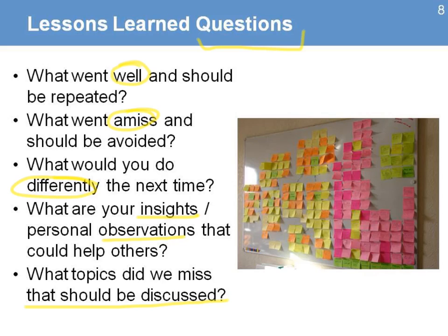One technique that is very useful is to make sure that when people are answering those questions, they write it down on colored papers. Each color can represent a specific category that you define at the beginning of the session. When people answer those questions, they can write it down, take turns to speak, and then place it on the board.